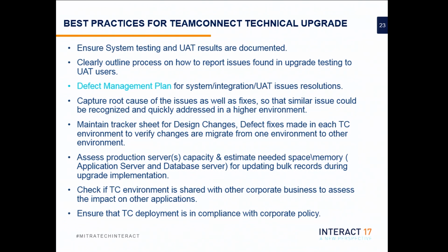And secondly, it's going to be the exact same file that was deployed in that environment, tested, and confirmed, and that same file has to be deployed in higher environments. You cannot do any manual tweaks or changes to that file. So with that, the file had to be changed.